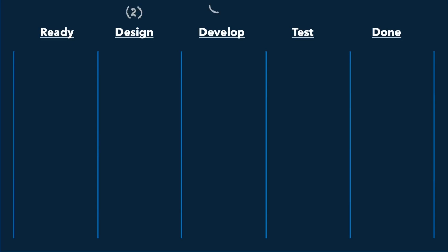So now let's talk about using Kanban to manage your workflow using a visual work-in-progress limited system. You can start with what you know by visualizing your current process as a series of steps that a work item transitions through. For example, a basic software development item might transition through design, development, and test. We would also include ready and done to indicate the non-work in progress states at the start and end of the process.